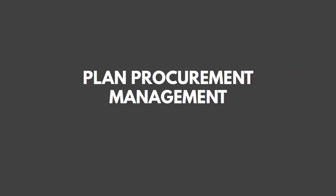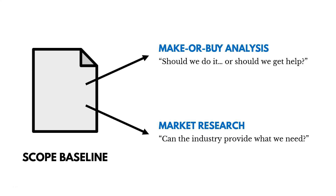In Plan Procurement Management, two of the key tools are Make-or-Buy Analysis and Market Research. In Make-or-Buy Analysis, we're determining what work we're going to do on our own versus what we're going to buy from someone else. Market Research is examining industry and vendor capabilities to determine who could do what we need — whether there's actually a seller or vendor out there that could provide what we're looking for.